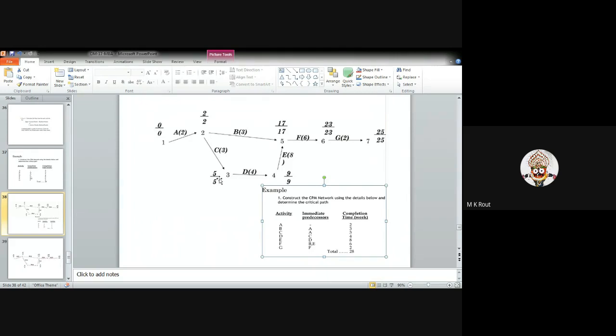Okay, okay sir. Okay. The next one is from C to D. C to D is given. What is D's completion time? 4. So I write 4 here. That means 5 plus 4, that is 9 by 9. Is it clear? Yes, sir.